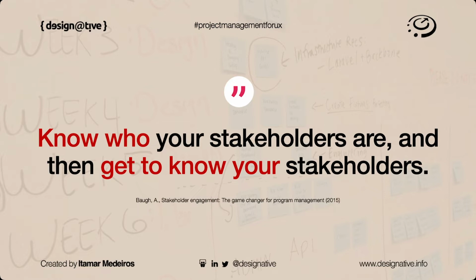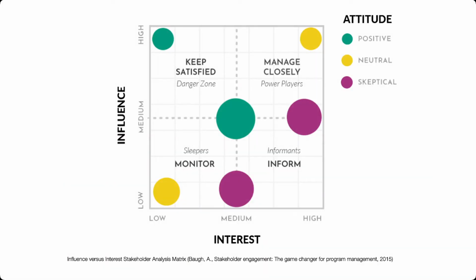In other parts of this series, we were talking a lot about decision making, and one of the skills that we were talking about is visual thinking. Well, we can use our own design thinking, visual thinking skills. One of the techniques that you could use is to put the stakeholders on a map. Some people call this a power map, some people call this an influence map. But regardless, you try to look at a couple of perspectives, right? So the first version of this diagram, you have two axes that you're trying to map your stakeholders in.